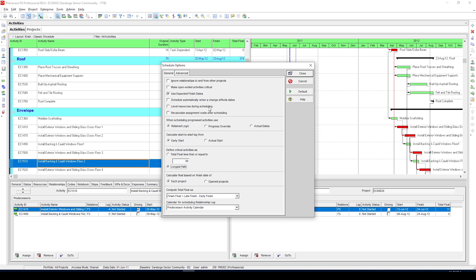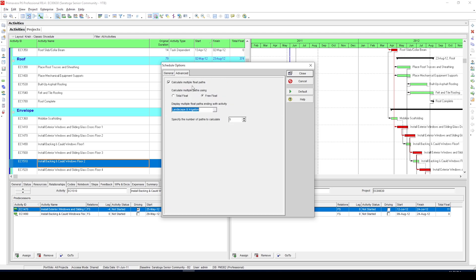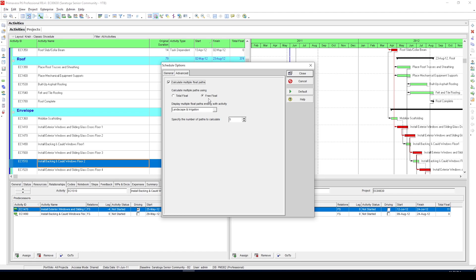Now go to the advanced tab and activate this option here and choose free float. Free float because Oracle has specifically mentioned on their website to choose this option when calculating critical activities based on the longest path option we just selected in our previous tab.